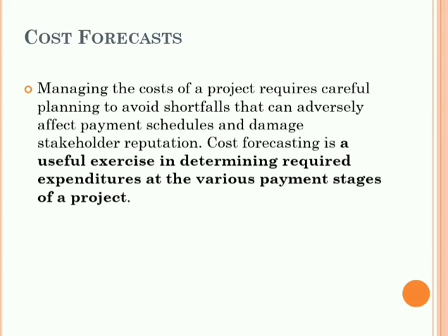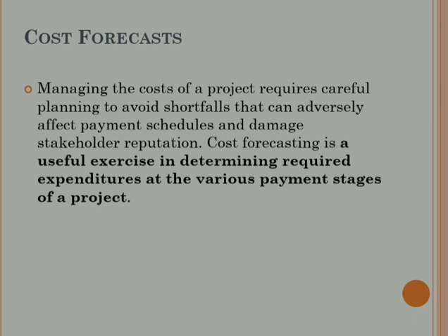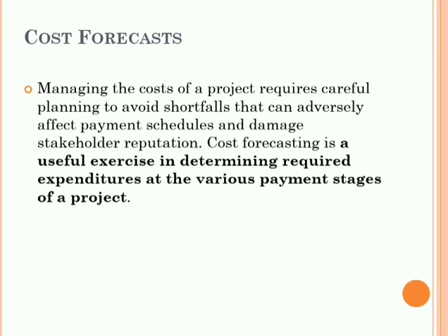For the remaining cost or to be committed cost, first you have to confirm that the actual and committed costs are correct, and then you focus on computing the remaining cost or to be committed cost. The remaining cost is calculated by assessing the remaining quantity of the resources and then calculating the cost associated with the remaining quantities. Now let us see the risk management, including the different opportunities.